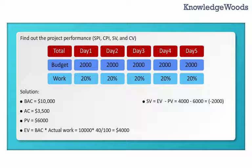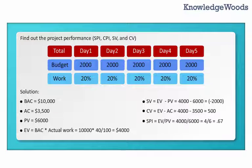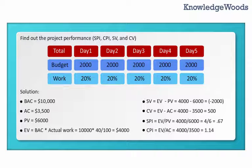Cost Variance: CV equals EV minus AC equals $4,000 minus $3,500 equals $500. Schedule Performance Index: SPI equals EV divided by PV equals $4,000 divided by $6,000 equals 0.67. Cost Performance Index: CPI equals EV divided by AC equals $4,000 divided by $3,500 equals 1.14.